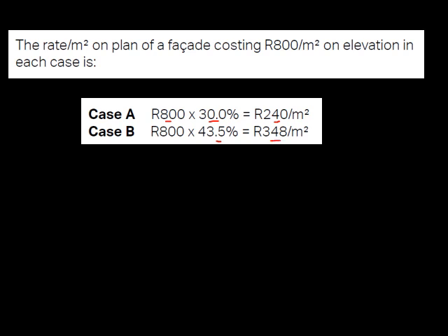So you can see how the shape immediately had an influence on the cost of your external facade. It doesn't necessarily have an influence on the rest. Obviously, the more windows you put in, the higher the cost, and the square building and the rectangular one might have the same amount of windows or openings, which will not necessarily have an influence on the cost. So just be mindful of that.